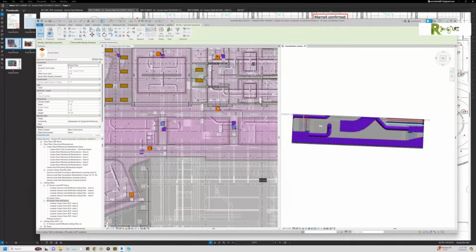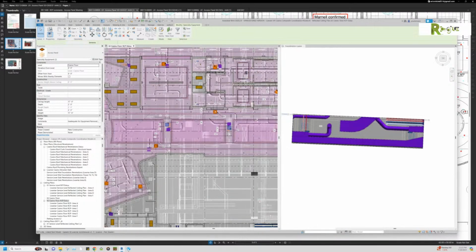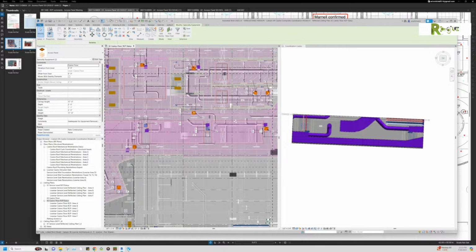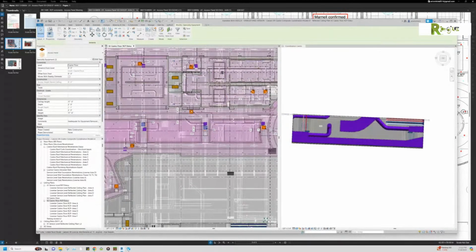Well, that's the frustrating thing, and it's actually a good thing for us to talk about, because this is the content that eventually we need to get out to everybody to understand. Well, I mean, it could have been resolved earlier if we had thought about that intent. When did it need to be resolved? Before we were pushed to send the ductwork out for fabrication. Do you know when that was? That was December. Okay, no, I get it. The boat left on that one.